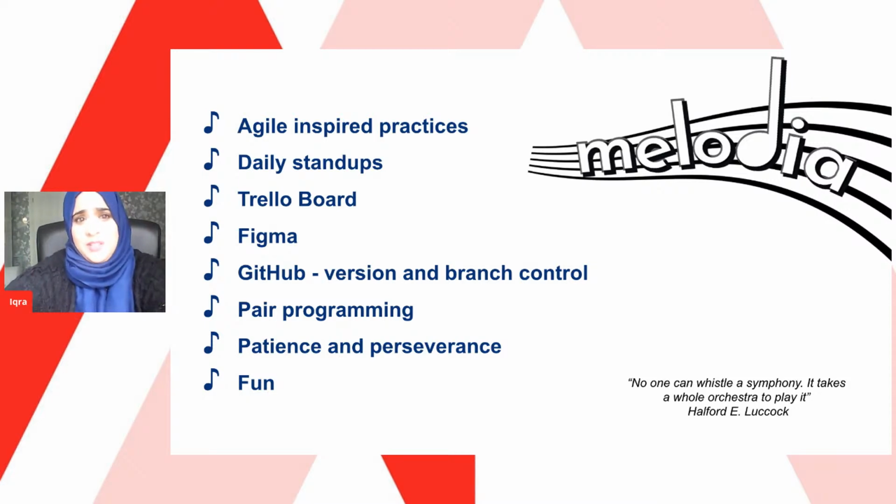It was essential that we prioritized our minimum viable product in order to meet realistic deadlines, in order to leave room for extra features. We are actually all studying remotely, so we were in constant communication via Zoom and Slack, rotating pair programming and committing work on GitHub with detailed commit messages. With patience, perseverance, and a whole lot of fun, we are incredibly proud of what we have achieved in the last 8 days. I'll now pass you over to Andrea, who will give you a deeper insight into the making of the app itself.